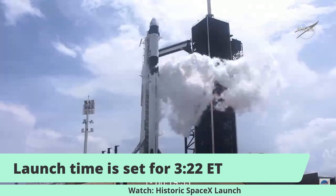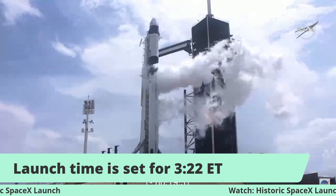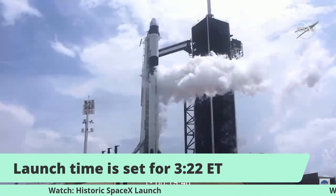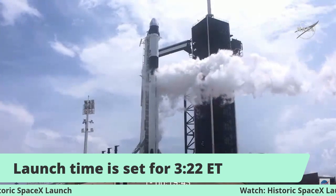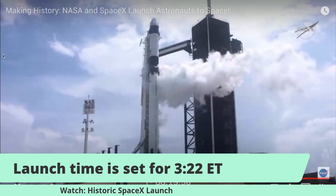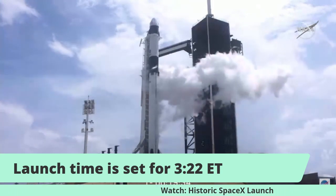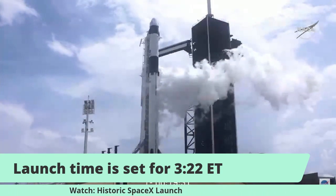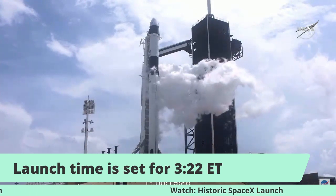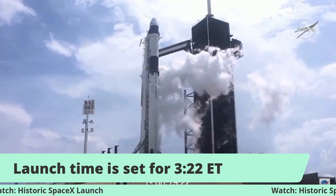We did begin propellant load at T-minus 35 minutes. Fuel loading on the second stage, I believe we just heard the call out that it is complete. First stage fuel load is continuing, and right now that's about 60% of the way full. So things are looking good. Second stage is getting ready to begin the liquid oxygen loading. After they finish chilling the lines that you see on the monitor, they'll begin the load at T-minus 16 minutes and 30 seconds. The range right now is go, ready to support.